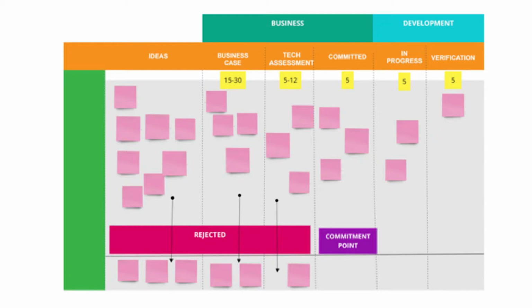In this, we'll pull some of our technical leaders and SMEs to make sure we have the right amount of knowledge around whether something is feasible, whether it's doable within our timeframes, or whether we even have the right skill sets to perform that work. Once it's committed, now we can actually prioritize it for teams to get done. Now remember, this is a pull system. If the teams are already working on projects, don't push more work in. Allow them to finish what they've started. Then they can pull that in and it moves to in progress.